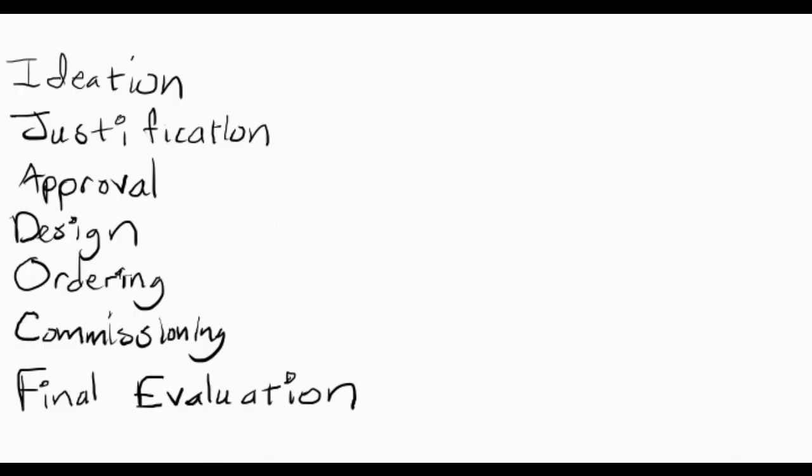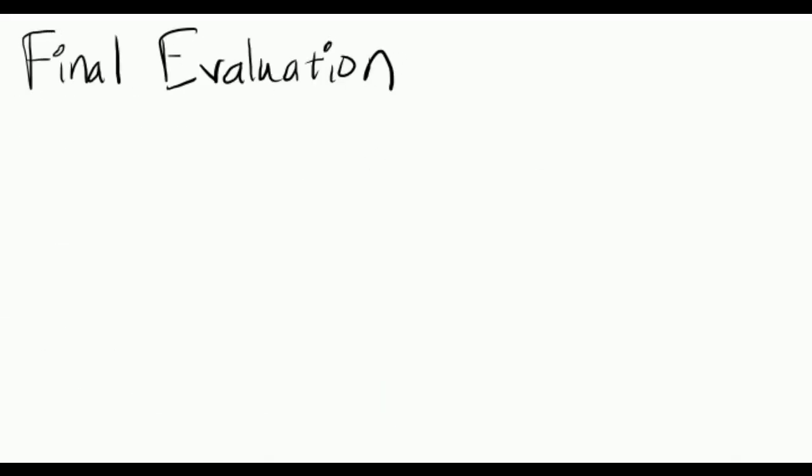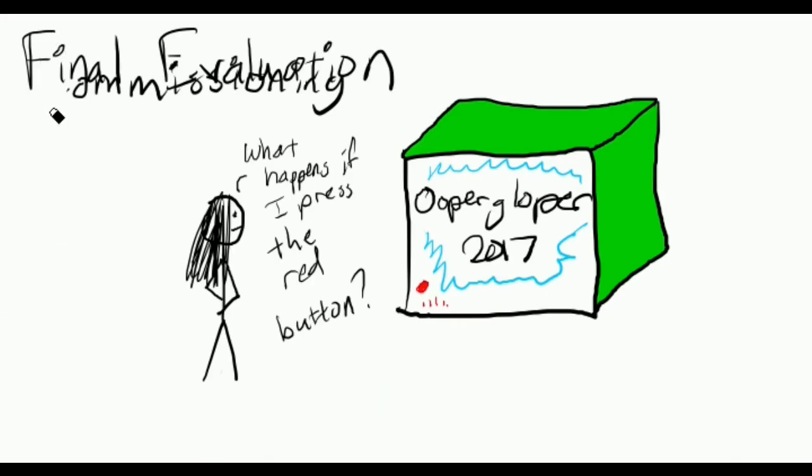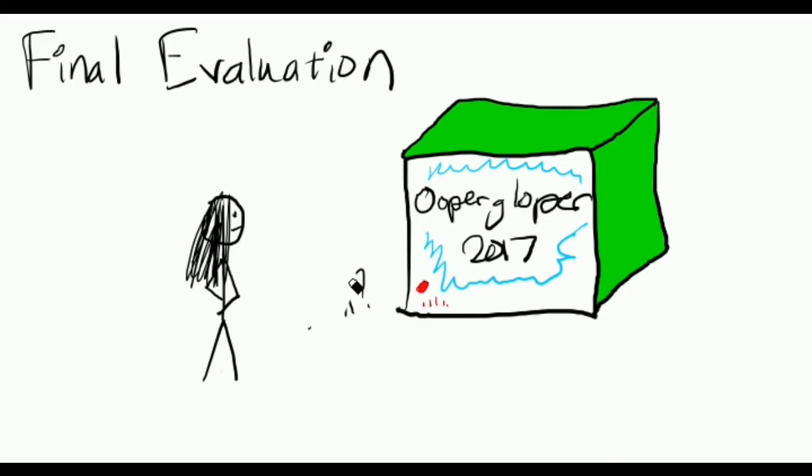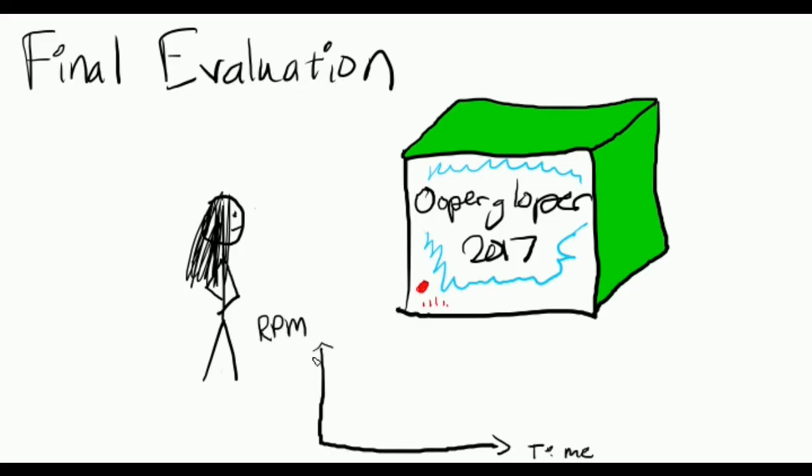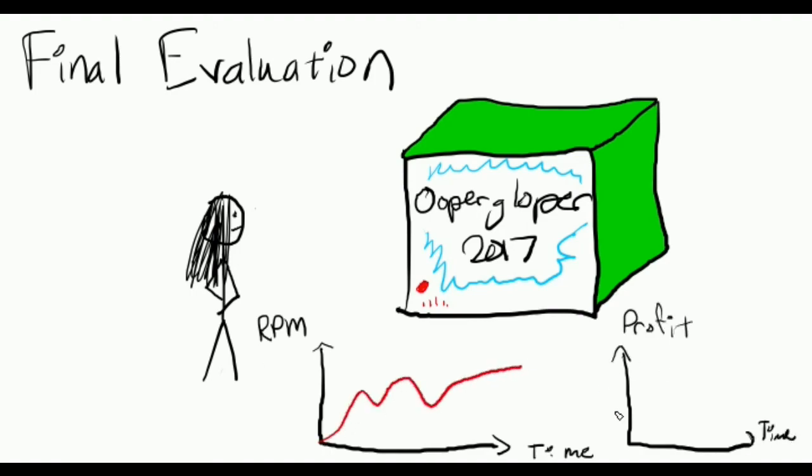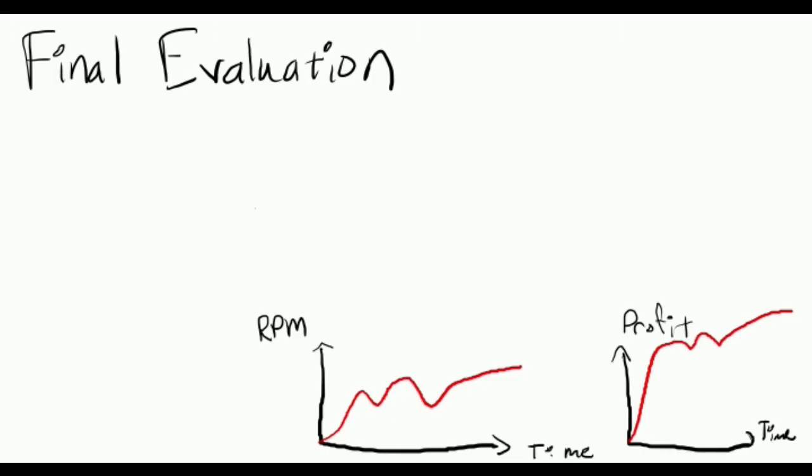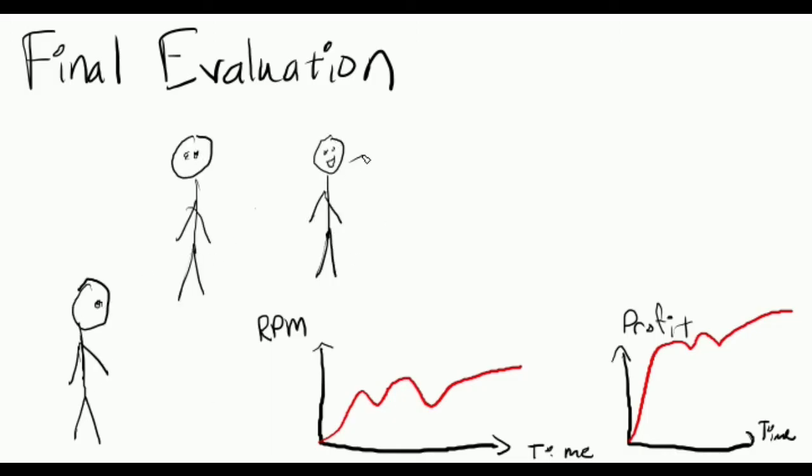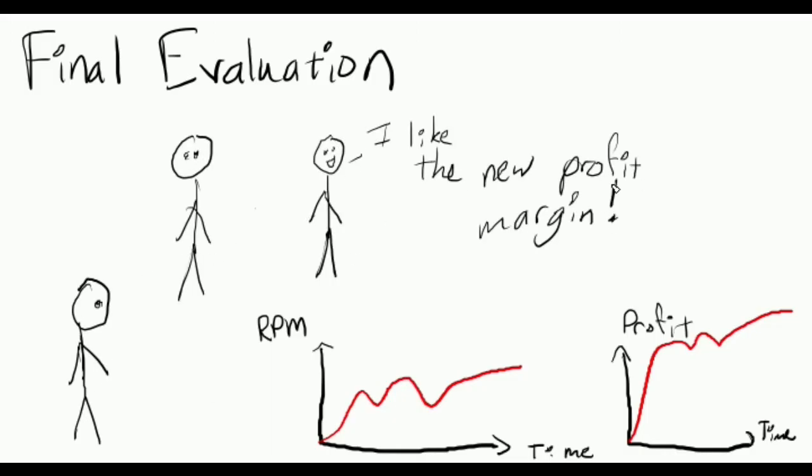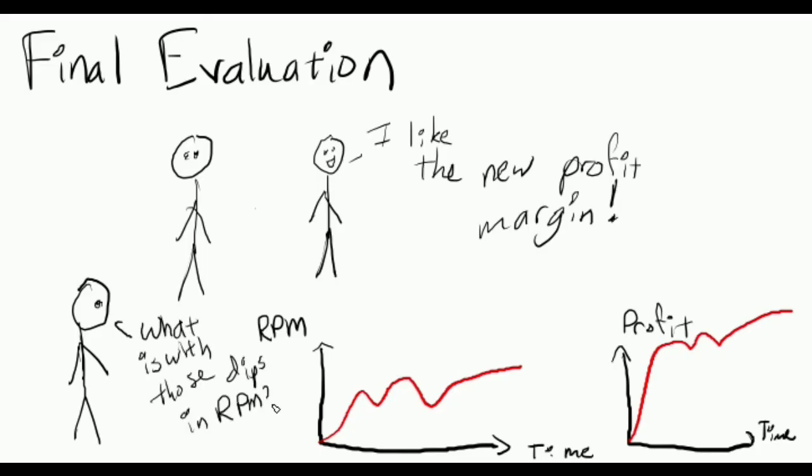Phase seven, final evaluation. After the full project is completed, and the new equipment has been running for a month or so, data is collected to prove the impact of the new equipment. This data will be presented to any members of the team involved in the machine setup, as well as the company management. The review will allow the team to look back and either congratulate each other for a job well done or create a lessons learned session to prevent any hiccups from occurring in the future.